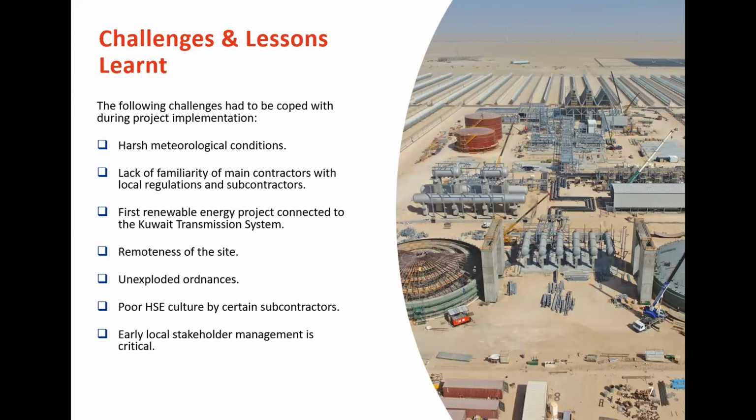The EPC and DBO contractors made huge efforts to define HSE requirements as per adequate standards that would be complied with by these subcontractors, but a lot of effort had to be made to make sure that close supervision was in place, providing training on health and safety to contractors and subcontractors, and implementing joint weekly HSE walkdowns to make sure that issues were not only identified but also followed up, and the improvement could be monitored.